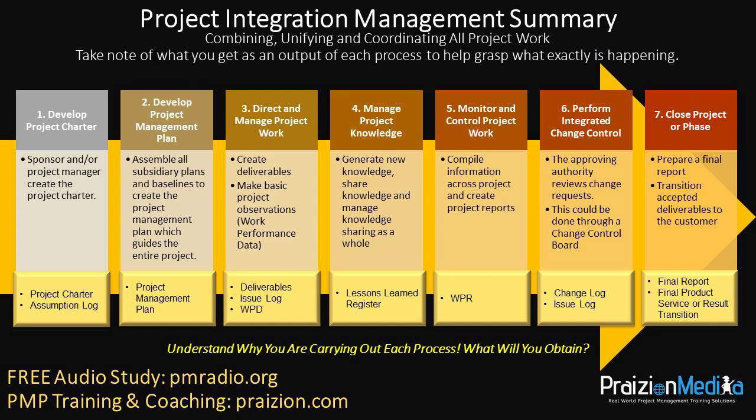Then we go into the monitor and control project work process, where we begin to monitor the project and we get work performance reports. And then we have perform integrated change control, which is where the change control board or the approving authorities on the project review the change requests and decide to approve or reject them or put them on hold, things like that.